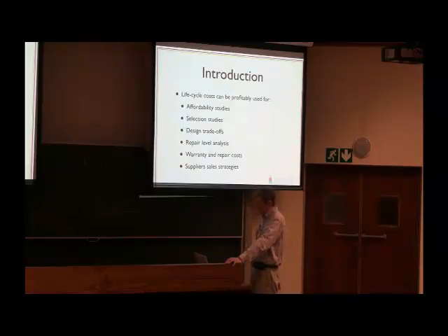Life cycle costs can be profitably used for, and here he makes a list of things that you can do with life cycle cost: affordability studies, when you are still looking at systems that you want to buy or at systems that you have, and whether you can afford to keep them or whether you need to replace them. Selection studies, design trade-offs, when you have to make decisions regarding different design routes to take, because some design routes might be very expensive, but the life cycle cost might be much lower than for less expensive designs. Repair level analysis, in other words, how much should you repair, how much should you put into maintenance in terms of money, because you might spend much more on maintenance, but in the end, the life cycle cost might reduce dramatically. Warranty and repair costs,